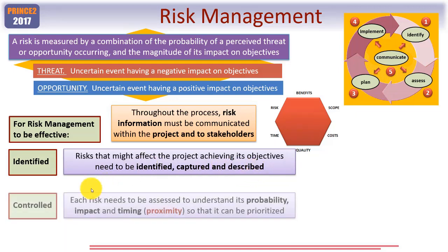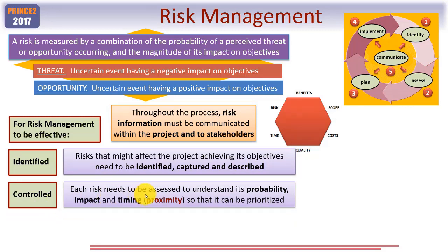The other aspect is controlled. This is where each risk needs to be assessed to understand its probability of occurring, its impact should it occur, and its timing, also known as proximity, so that it can be prioritised.